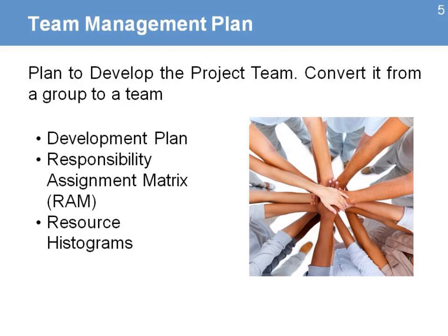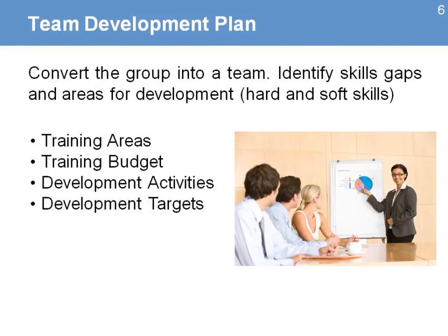The team management plan is a plan to develop the project team and convert it from a group to a team. That means we are going to have a development plan, we're going to have a responsibility assignment matrix, and a resource histogram. Converting the group into a team means identifying the skill gaps and areas for development, both hard and soft skills.